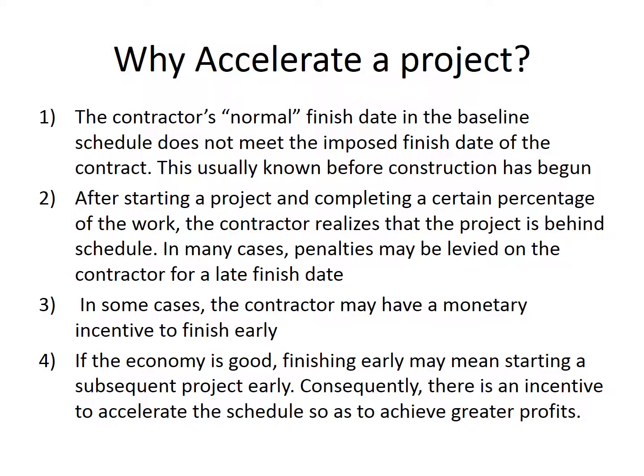Two, after starting a project and completing a certain percentage of the work, the contractor realizes the project is behind schedule. In many cases, you can have penalties for that. I have been in that situation also. I remember a couple projects being 3-4 months behind schedule, and it's not a fun place to be in, but firsthand I can tell you that accelerating a project generally concerns overtime and additional hours. Of course, I never got paid overtime because I was a salaried employee, but an 80-hour work week is one way of accelerating a project. Number three, in some cases, the contractor may have a monetary incentive to finish early.